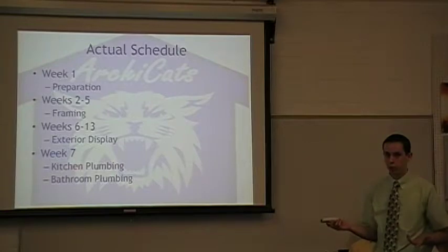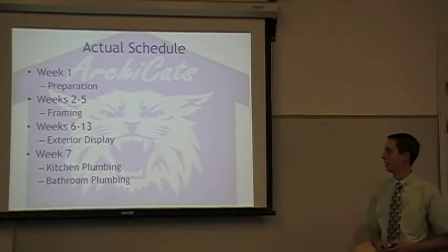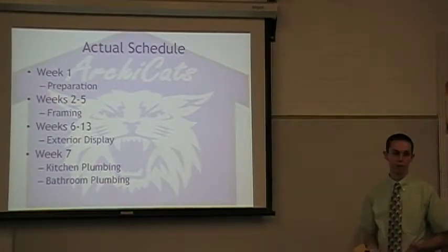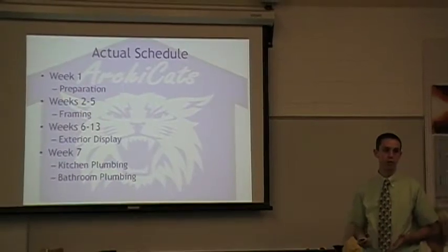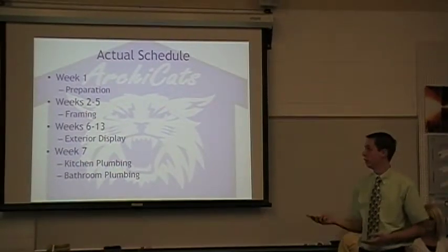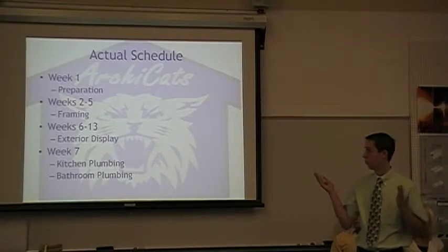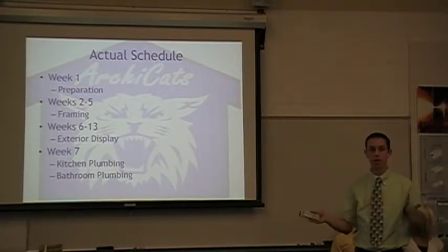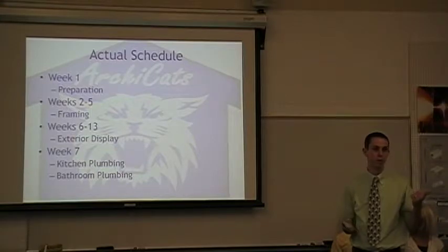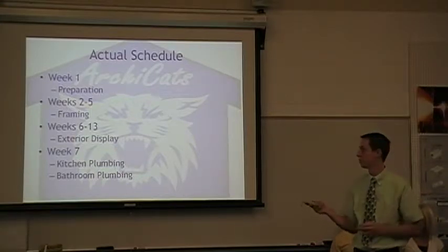The actual schedule was a lot different because it was mostly dependent on material availability. When we got the material, we used it and we built. So what ended up happening is, from week 2 to 5, we framed everything all at once. We were a little bit concerned about space in there, but we were able to shift some things around. So everything was framed by week 5.